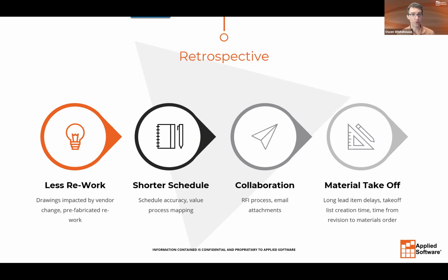If I'm going to look at shorter schedules, I can't get a shorter schedule if I don't take the time to say, what was my initial estimate of the schedule and what actually caused me to miss that schedule? If I did baseline revisions after that and washed away all that sin under the bridge and said this was all fine, we were actually on schedule, that isn't going to help you address what your engineering and plant design situations are that would help you actually stick to the baseline.